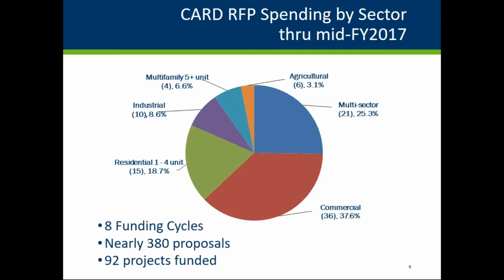The subject of today's webinar is the commercial sector, and it reports on an initiative in Minnesota that we've tested known as performance-based procurement, which allows building owners to specify energy performance targets in new construction and major renovations. That allows them to select construction teams based on their ability to meet those targets and then hold them to those targets throughout the process.